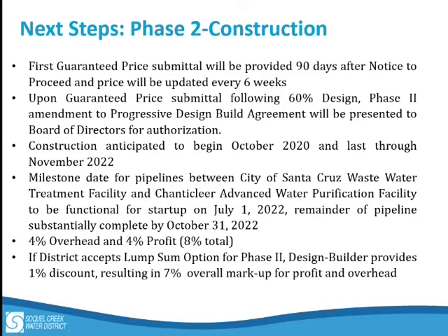I already talked about the guaranteed price coming in around 60% design, and right now the schedule shows construction lasting from October of this year through November 2022. We did establish a milestone so that the first segment gets completed in July of 2022 to make sure that there's no delays in plant startup. And then the remainder of the pipeline can follow and be finished, substantially completed by October 31st,